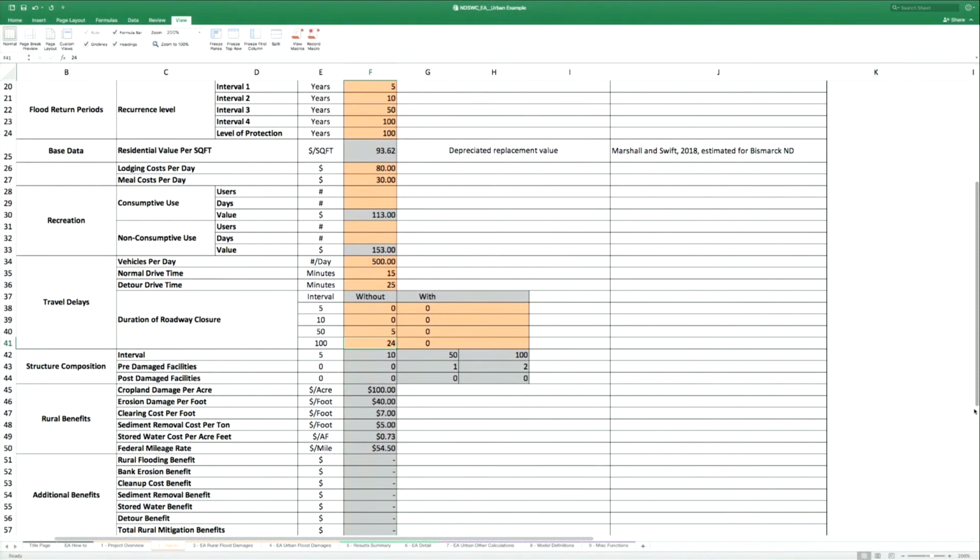So you could actually handle it in a couple of different ways. You could either calculate that benefit separately, or if you want to treat it like an apartment, for example, and you have a physical damage to it, the apartment curve has a displacement cost associated with it based on an assumed square footage. You could just do a hand calculation and then also plug the value in there as an apartment and see how comparable the estimates are. Maybe that's a ballpark that you can use. So there's a number of ways that you could probably plug it in.